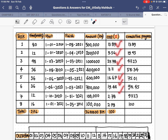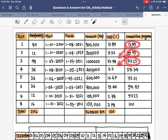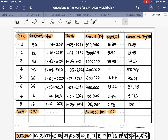For cumulative progress: the first activity is 13.89%, then I add the next to get 19.45%, then adding 7 gives 27.78%, then 47.23%, then adding 11.11% gives 58.34%, and continuing in the same way I will ultimately reach 100%.